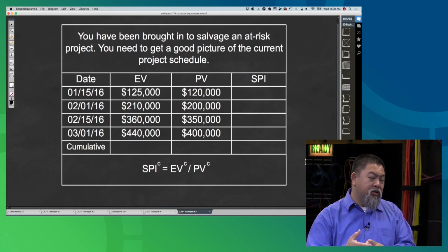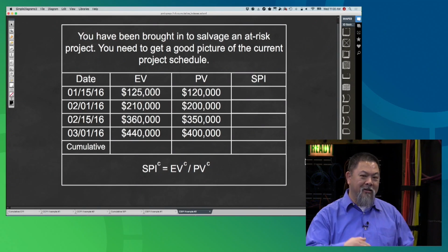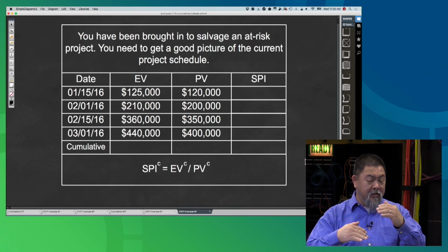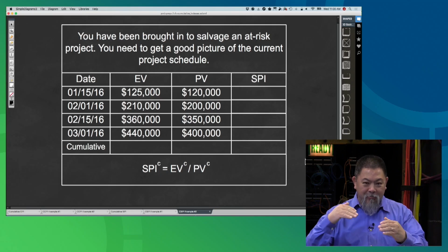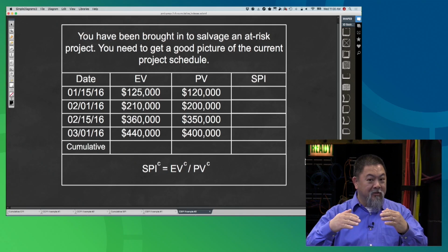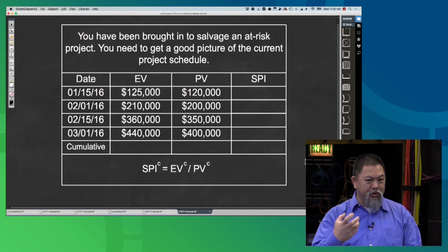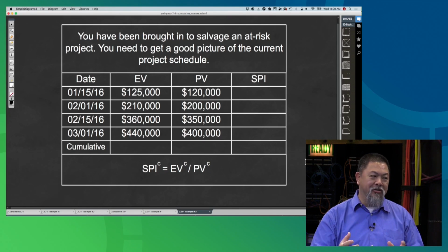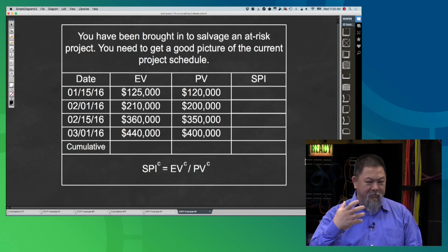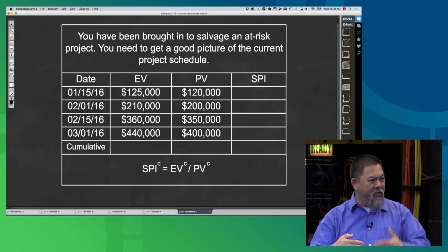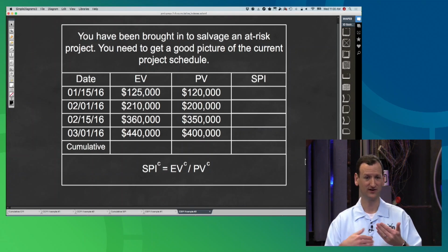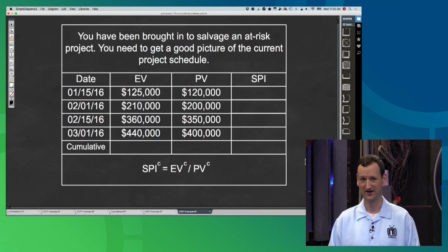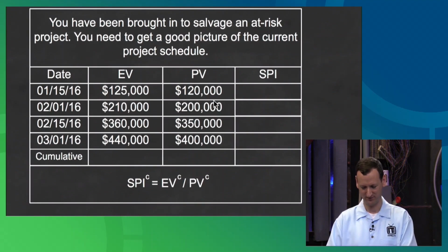But the totals themselves, this is where I'm getting confused, right? You're saying that in each column there, the earned value and the planned value, if they're cumulative, they should both be cumulative. You shouldn't end up seeing, I'm not going to say you can't, but where one's going to be iterative, in other words, each reporting period, and the other one's cumulative, right? If that happens on the exam, then the answer you'll have to choose is the one that says not enough information provided, right? So let me clarify on that statement real quick to show what you'd get, because all of mine appear to be cumulative.